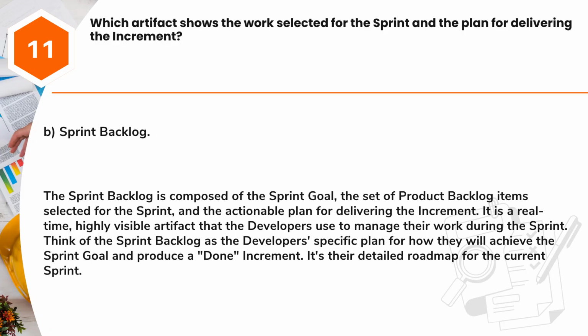Answer: B. Sprint Backlog. The sprint backlog is composed of the sprint goal, the set of product backlog items selected for the sprint, and the actionable plan for delivering the increment. It is a real-time, highly visible artifact that the developers use to manage their work during the sprint.